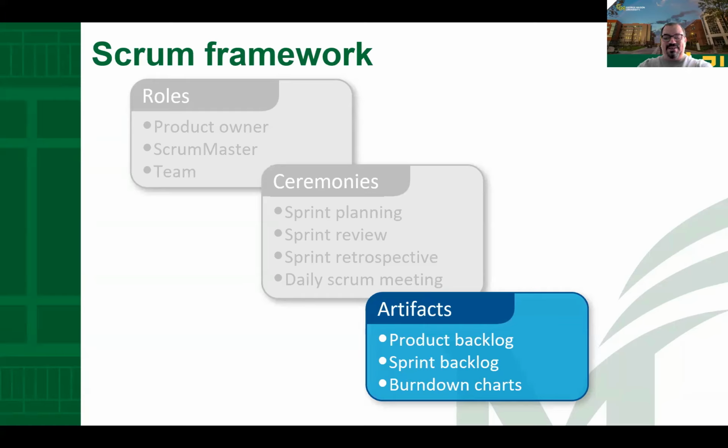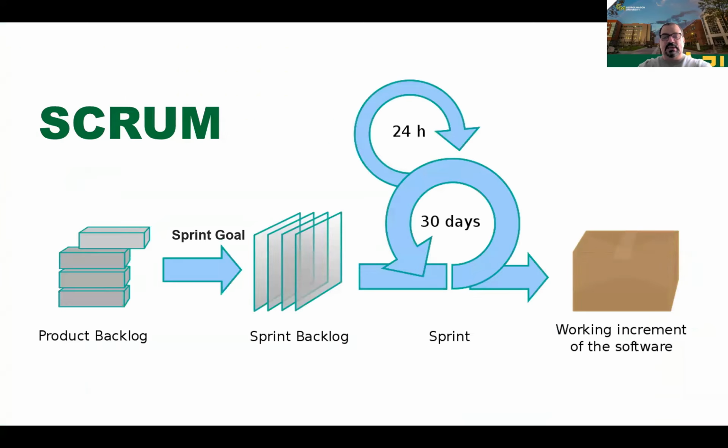So, the next phase is the artifacts. Okay? So, what are the things that you need to develop during the Scrum? The first one is the whole cycle. Remember the phases? Okay, go ahead. You have the product backlog. That is the time that you define what the system needs to do. You do it at the beginning of the project, but it's iterative, every iteration or every sprint you can revisit and refine. You have the sprint goal that defines what you do during the sprint. Based on the sprint goal, you select the items in the product backlog and transfer them as tasks into the sprint backlog.